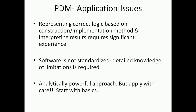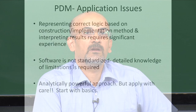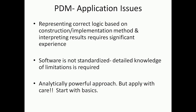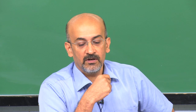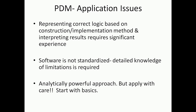When you get to software, I would encourage you to use any standard software and enter PDM with negative lags or leads - you will see the software itself does not give you reasonable answers. There is no standardization in the software; in addition to knowing the concepts in detail you need detailed knowledge of the software's limitations. Software also has constraints like must-start-on, must-finish-on, must-finish-before, must-start-after, which make it more complex. While we have a really analytically powerful approach in PDM, apply it with care, start with the basics, and then scale it up.